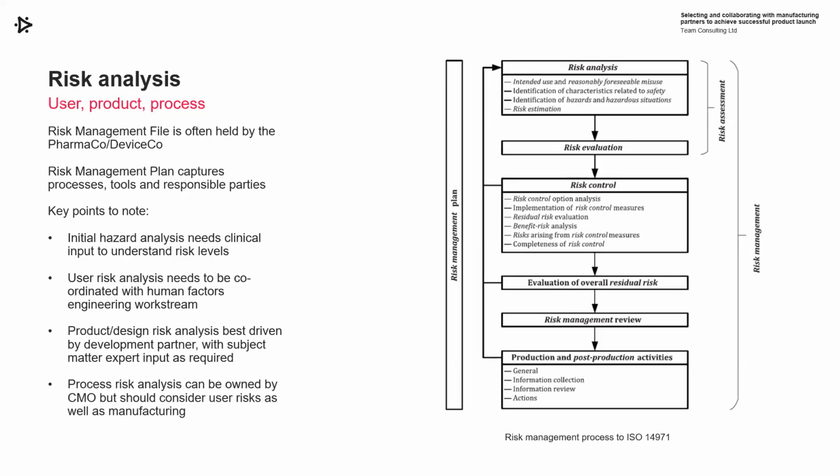A few key points. So initial hazard analysis will need clinical input, certainly for a medical device, drug delivery device or surgical device, to really understand risk level. So wherever that clinical input comes from, it needs to be secured early on. The user risk analysis will need to be coordinated with a human factors engineering plan. It's clear within the standards how to do that, but again, if that's happening across two organizations, then make sure you're coordinating that.